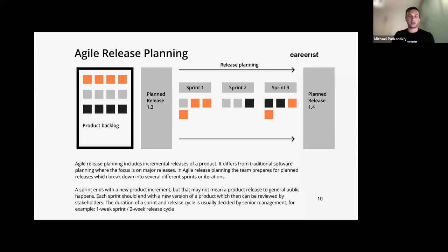In that backlog, you can also prioritize things based on what you want to get to in your next sprint, in your next 2 weeks. Because let's say a customer says, I really need this new feature, but you've already scoped out 3 weeks in advance and you know what you're working on. So you're going to put it on the backlog because you don't want to forget that you need to get this done at some point, but it's not something you can get to right away. Yes, simply a list of all things that need to be done within the project. Yes, that's the simplest way.